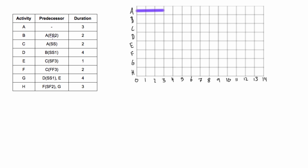Activity B depends on A. It's a finish-to-start relationship with a lag of two. So that means we have to find the end of A, count two days for our lag, and then because it's a regular finish-to-start relationship, we can start at that point two days after and then go for two days because that's its duration.